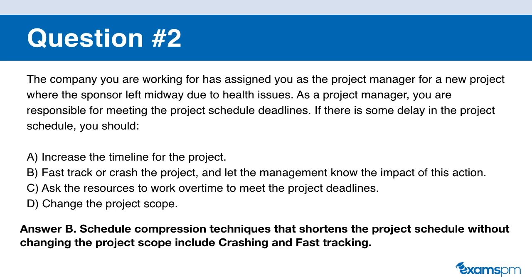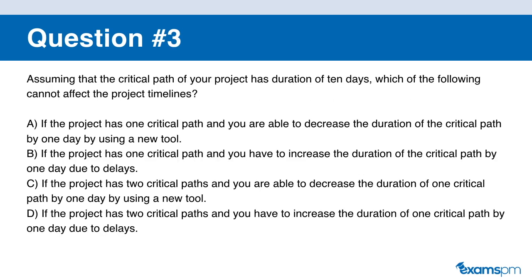If you said B, you are correct. You can use schedule compression techniques to shorten the project schedule without changing the project scope. Schedule compression techniques include crashing and fast tracking.